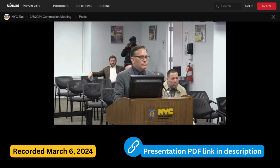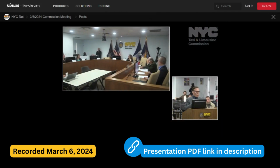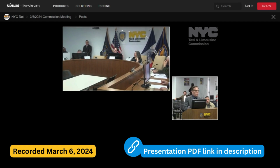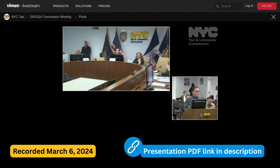Thank you. And Commissioner, most of the building has already been demolished, and now they're doing foundational work. And so we hope to be ahead of schedule, or at least meet the original deadline. But obviously, with added scope, sometimes that might provide additional difficulty. But we're still hoping for 2028. Thank you. You're welcome. Any other questions?